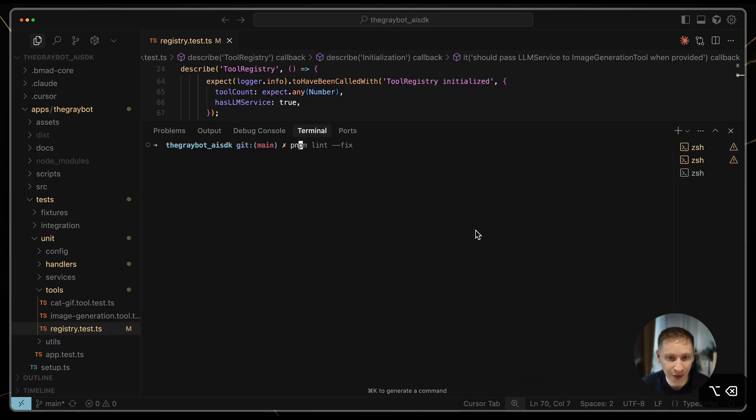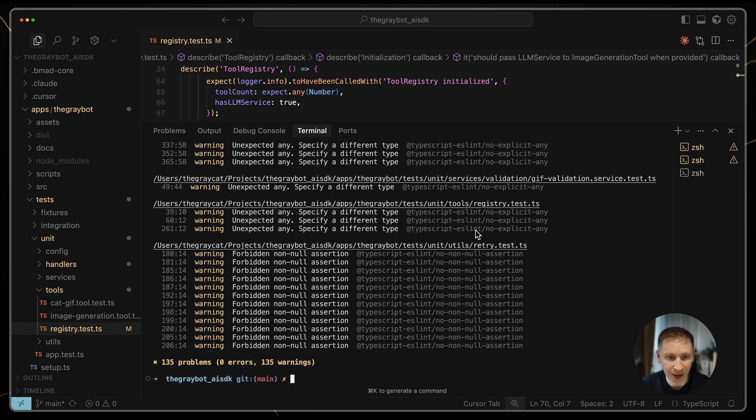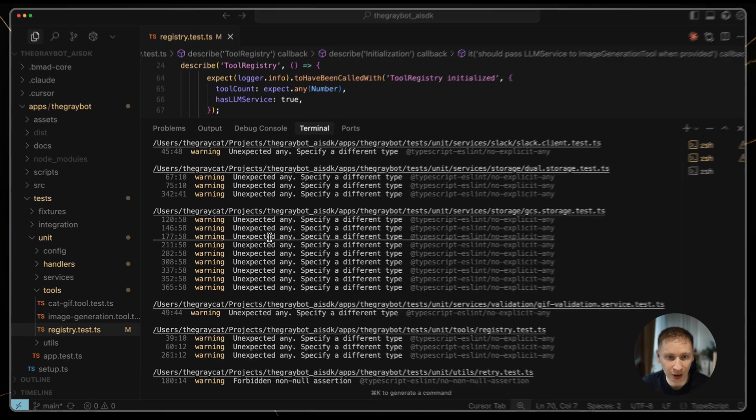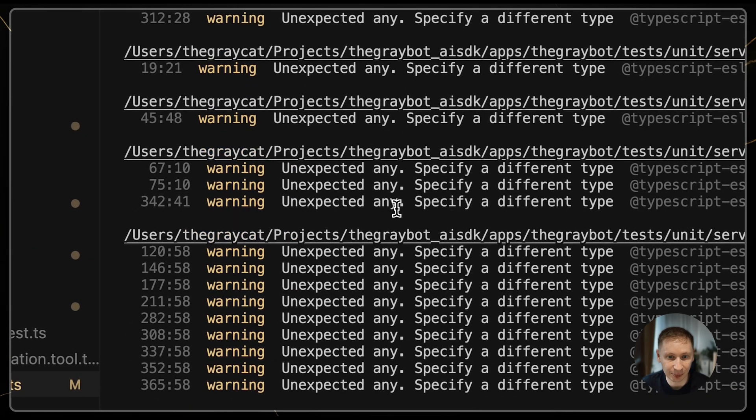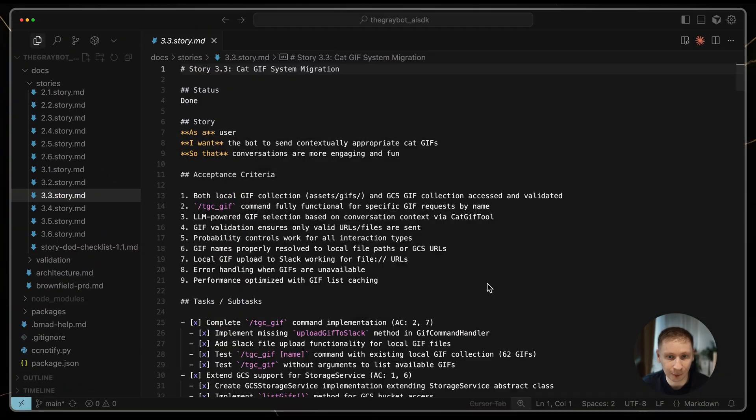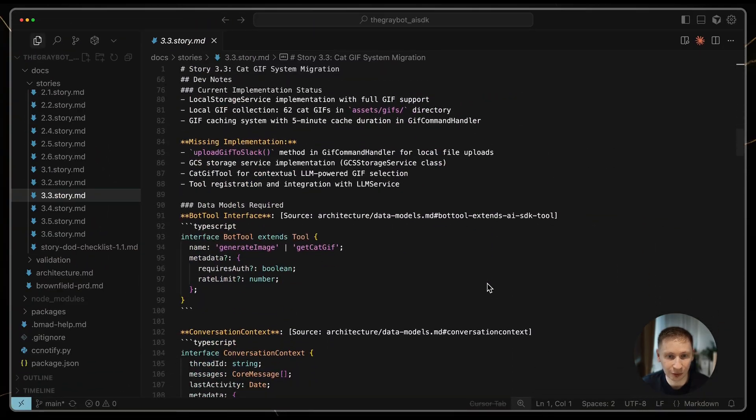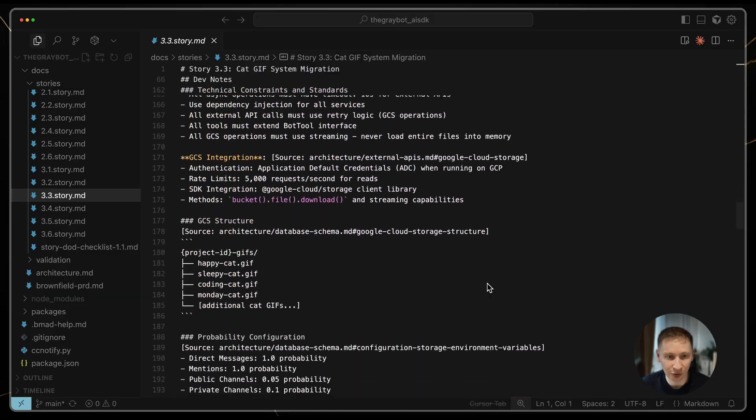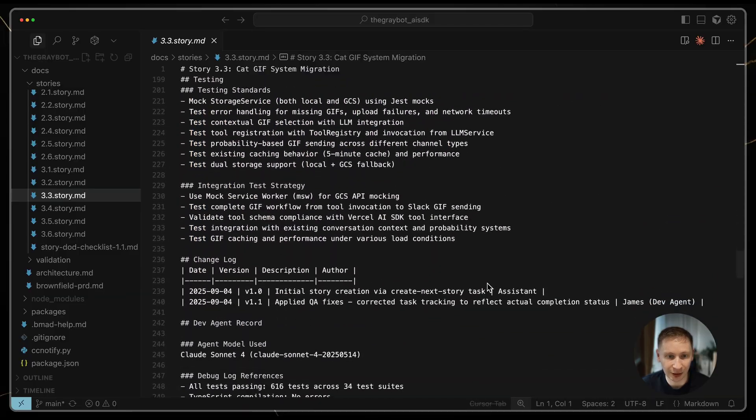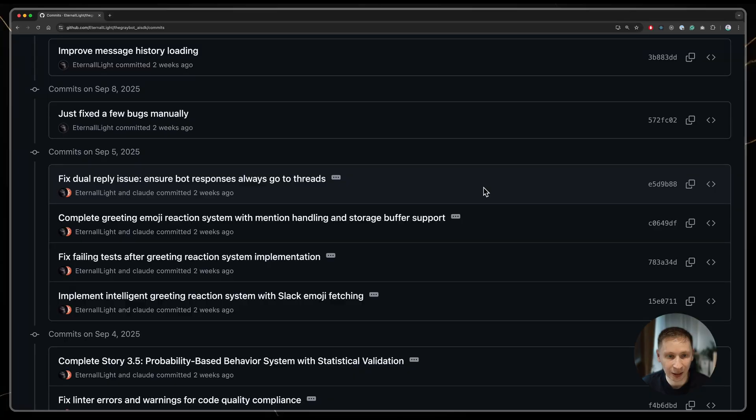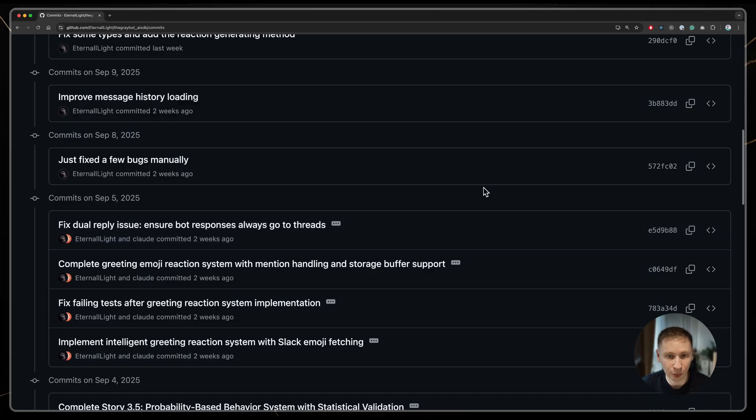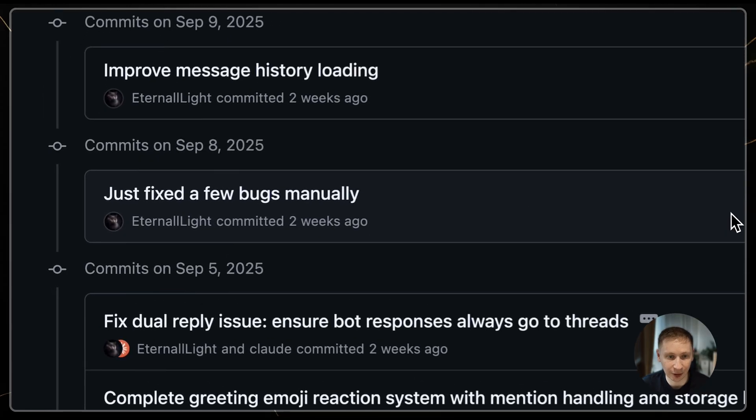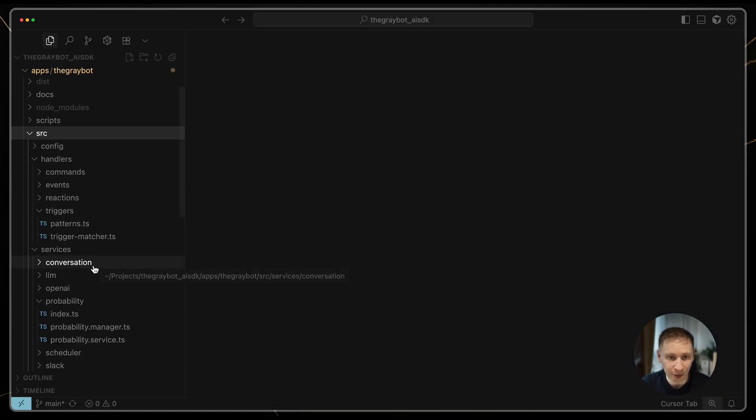As the codebase grew, the quality started to deteriorate. It began using any types all over the place as a shortcut for type mismatches it couldn't figure out. Some features were missing entirely, even though they were in the stories. I realized the stories were probably too large for the AI to handle in one go. I had to dive into the code manually to fix and refactor things.